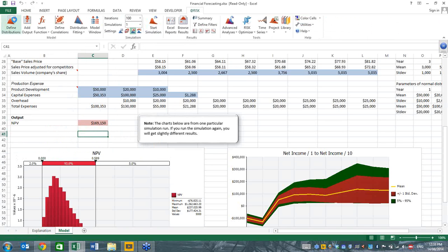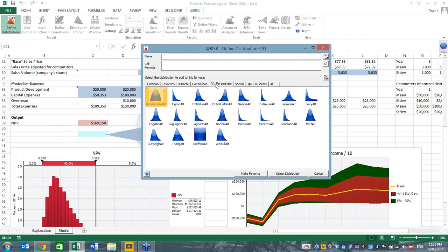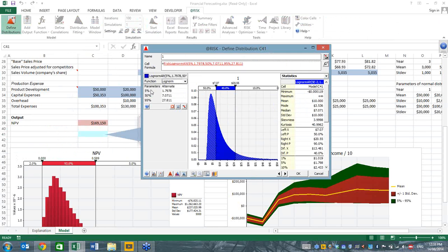For those of you who do use the software a fair amount, especially in project cost estimation or any field where there's a lot of estimation, hopefully, especially if you've done our training already, you will be using alternate parameters almost all the time. By default, the alternate parameter options are P5, P50, and P95. These are the arguments that you need to include. But you aren't stuck with these values. The worst way, if you like, or the least elegant way to change them would be to build the function and then manually edit these percentiles in the cell.